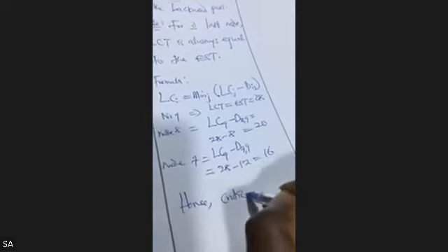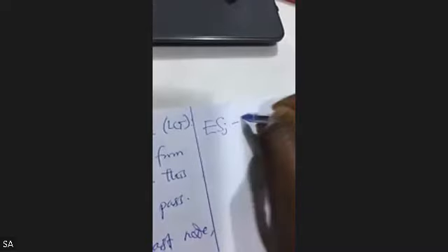Okay, so now, hence, critical parts. Critical parts is where the earliest starting time is equal to the latest completion time of the starting point, or where the earliest completion time is equal to the latest completion time of the ending point. Which is also the same thing as ESJ minus ESI equals LCJ minus LCI, which is equal to DIJ.